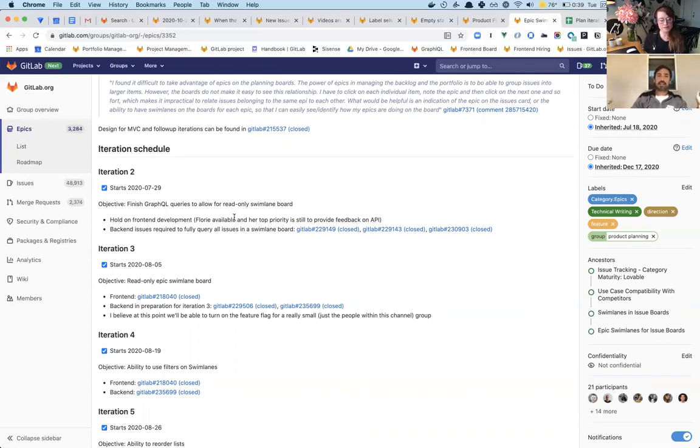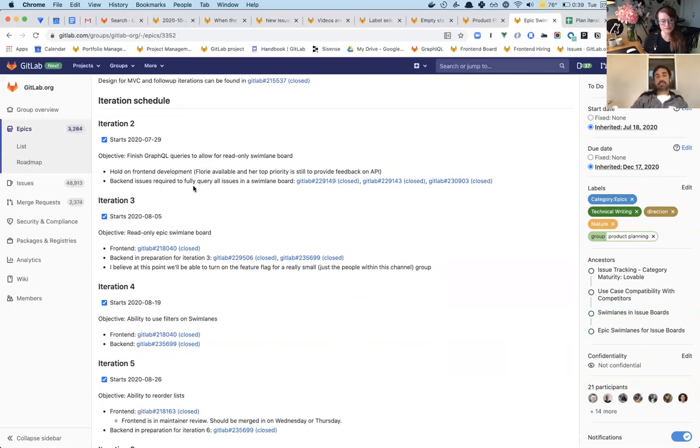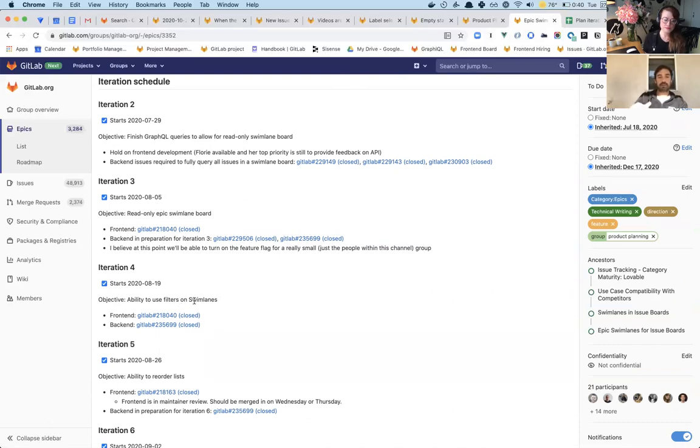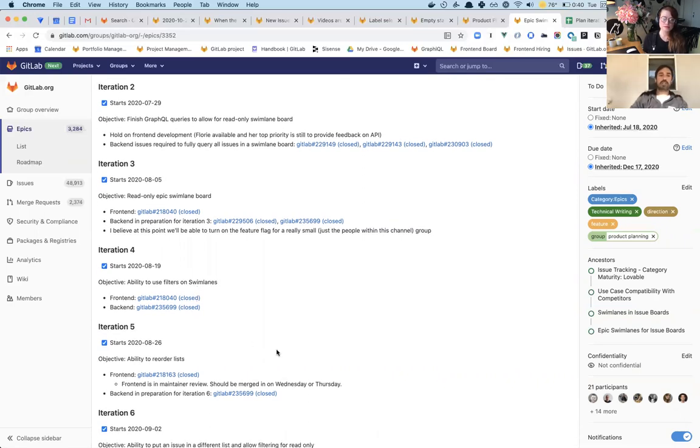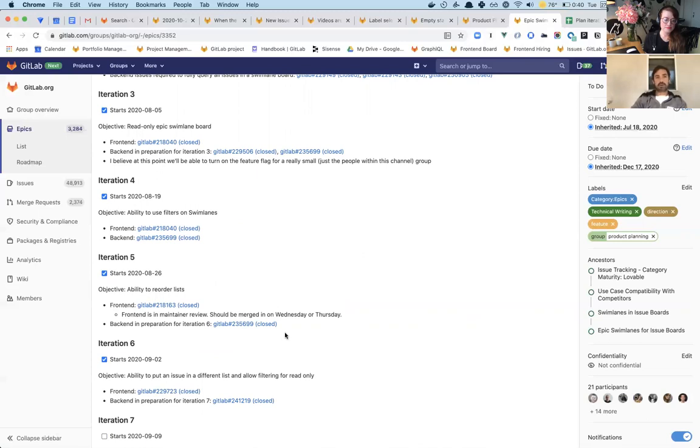And that was okay, because then we were able to say, this is going to take another iteration. Let's just push everything in the upcoming iterations back another iteration, or we could have adjusted something, like pulled something up so that we were working on it in parallel with another objective from a sooner iteration. So there's just a lot more flexibility when we had things chunked into these small iterations.